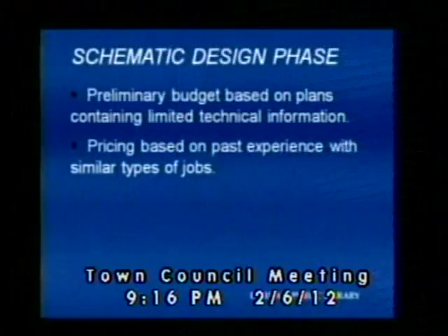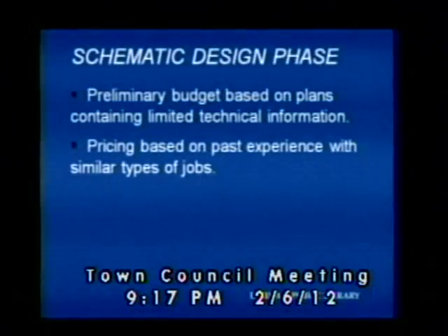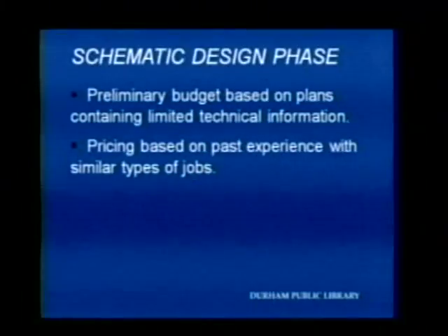Based on our past experience, and we've been fortunate enough to be involved in quite a few library projects over the last 20 years, we develop a square foot budget based on prior experience and looking at the site and the floor plans and elevations.